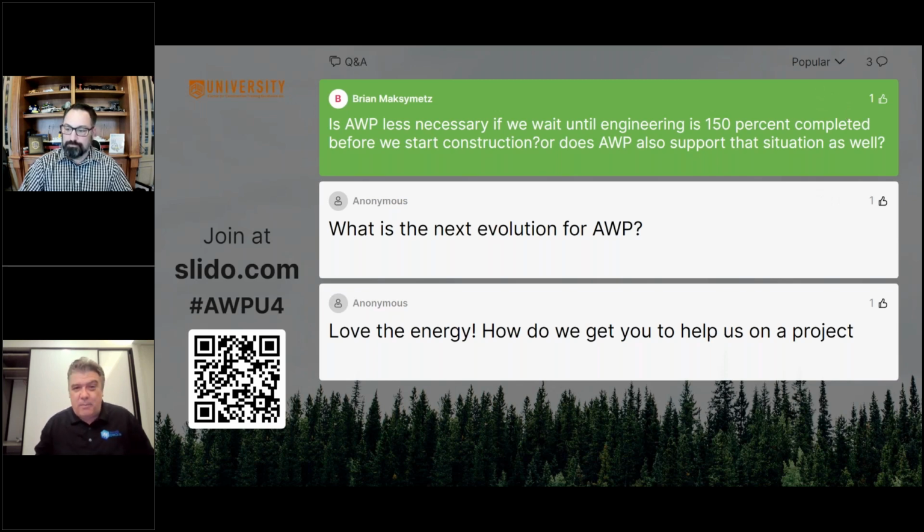You start trying to build it virtually, and it's like, whoa, what would normally become an RFI from the field became, hey, let's get with engineering and get this clarified. And you don't have to wait for a request for information and a hold in the field because I've got a question. I can't remember the number, but it was not insubstantial. It was in the dozens of things that got ferreted out where engineering had to make clarifications and tweaks on things that they had engineered 2 years ago and thought they were done with.